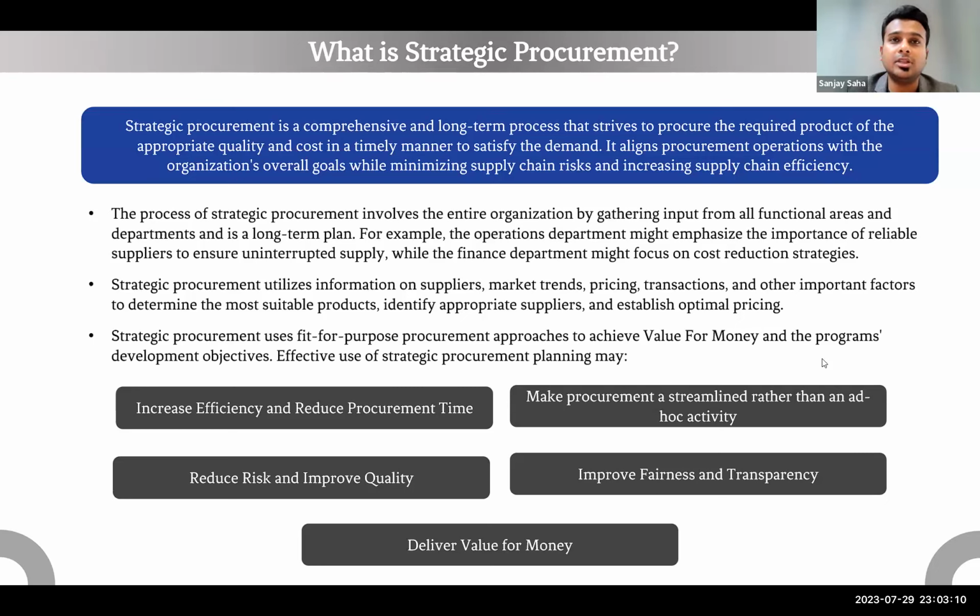So let's say if a state in Nigeria does procurement of health products in that particular state, to organize a procurement strategy for that state, they should bring all the different stakeholders together, like the DMA, representatives from the State Ministry of Health, LMCUs, representatives from the local government authorities, maybe someone from the Federal Ministry of Health, maybe some donors or implementing partners, and then talk about this so that they get the inputs from all different sides, which can be considered while creating a strategic procurement plan.